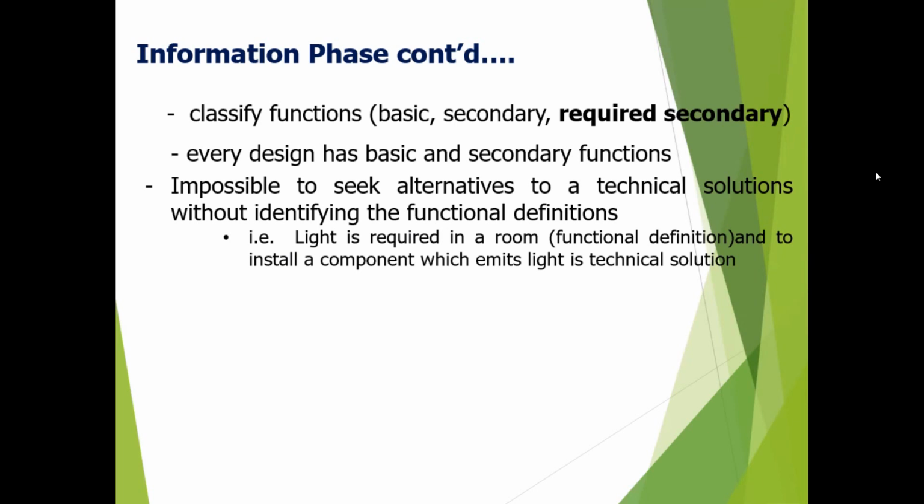So every design has basic and secondary functions. It is impossible to seek alternatives to a technical solution without identifying the functional definitions, whether it's a basic function, a secondary function, or a required secondary function. So we need to classify that, identify that.